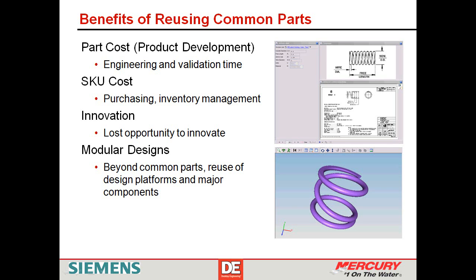Going back to the picture that we saw on a previous slide, the two engines, one from racing and one from Mercruiser. We launched the new Mercruiser engine, an 8.2-liter inboard stern drive engine, just last year. It's the only catalyzed big block gas stern drive, and we created it in record time. To complete that project, we maximized the use of existing components. To be specific, 76% of the new 8.2-liter engine is made from existing parts. 15% are from its predecessor, an 8.1-liter engine. 60% are from the racing product that you saw with the orange paint. They're mostly built from the same block casting.